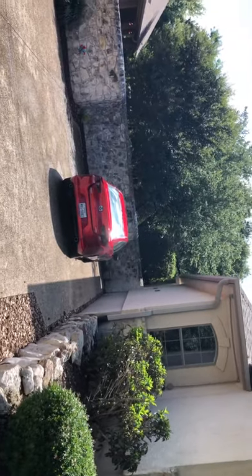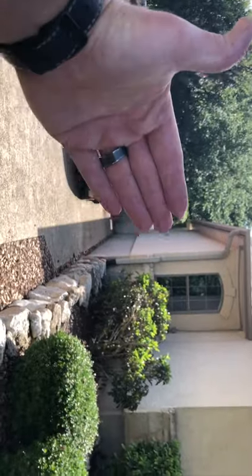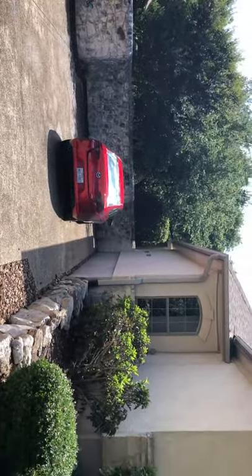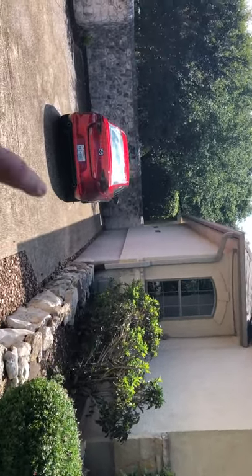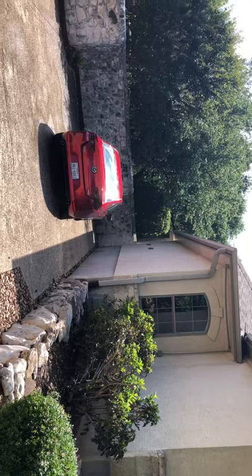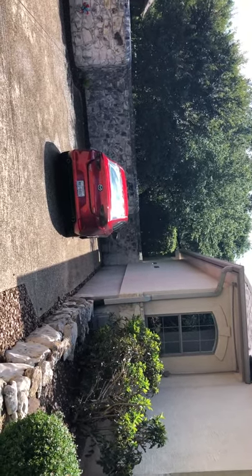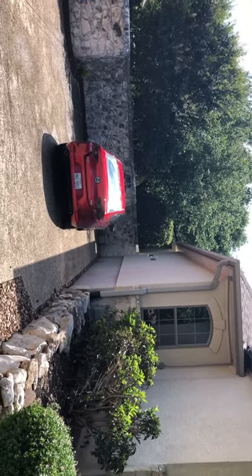Really only about 25 to 30 feet of it is behind that wall. Everything forward of the wall we can paint with no problem. We're doing all the stucco. There is a little atrium on this side and we're going to do inside the atrium too. There's one spot in there where we just need to patch — just silicone the stucco and patch that area inside the atrium.